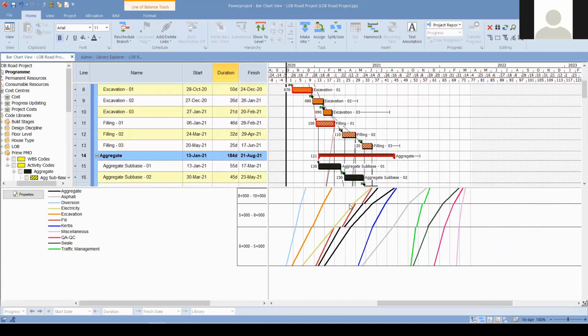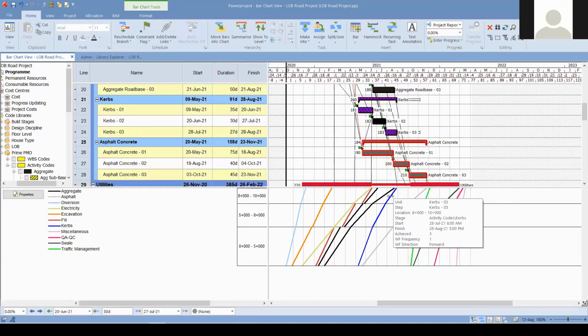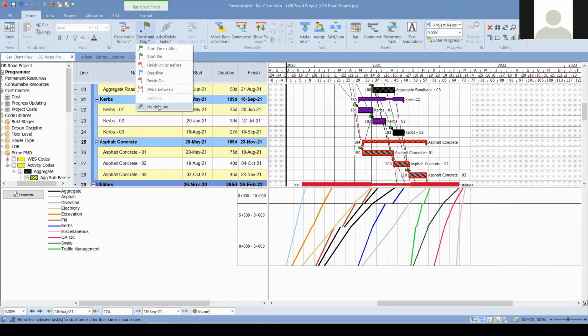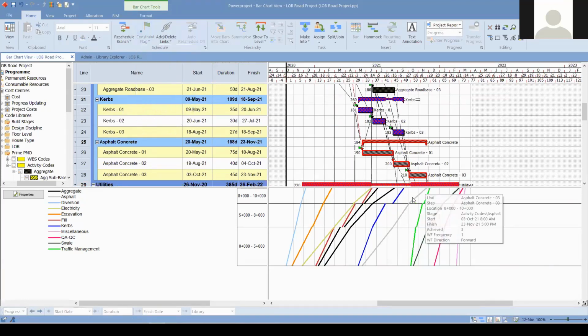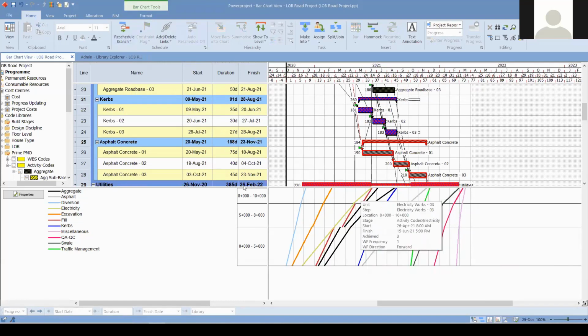So these flows, any other resource or activity clashes, may not be seen on the traditional Gantt charts, but you see that once we play with these activities, automatically the activity also moves along, and we have a holding pin, which is a constraint after rescheduling. So the activity start and finish date will be maintained according to our constraints.